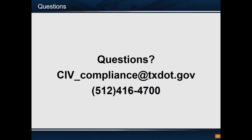Does the DBE monthly report need to be submitted during a month when there is no work on a project? The answer is yes. It's basically an auditing measure to ensure that each month was recognized.